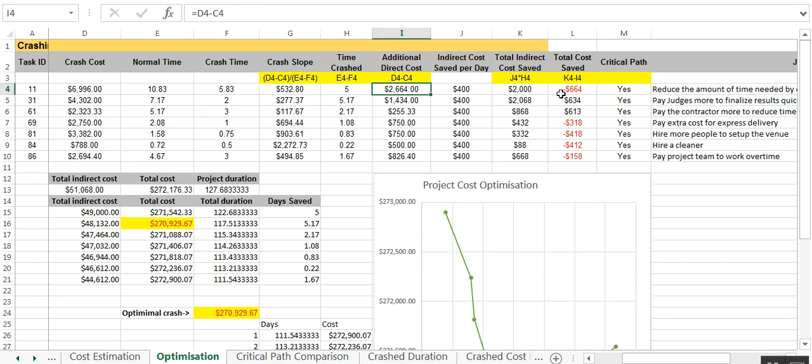The logic problem is if you multiply them all out, you think that's the greater saving, so maybe that's the one we actually crash first. So I can see it. In practice it probably makes little difference, but it could create logic problems on other occasions, so that's why it's not quite as tight as it could be.